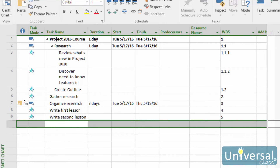When you set a start and finish date for a task, it applies a constraint that can override any dependency, which we'll learn about later, or any other timing factors. We'll learn more about constraints later as well, but for now it is easy to learn how to set a start and finish date.